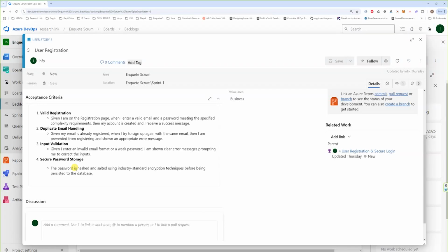Yeah. So now that you said that, you see we're actually in a refinement right now. You asked a question, and that question is not clear in this user story. So now you have prompted me as the analyst to clarify. And anything I clarify, it's very important to put it in this story so that it will be documented. I have to add it now.